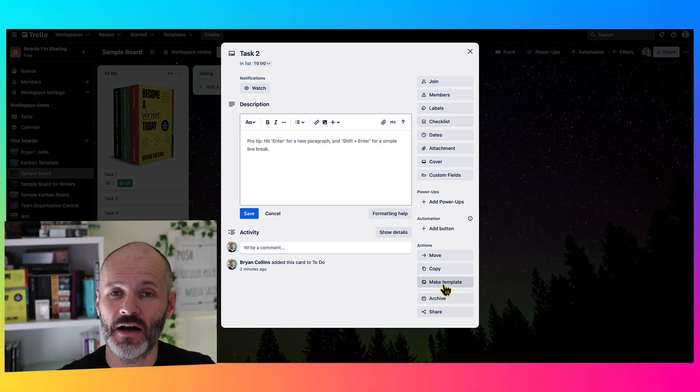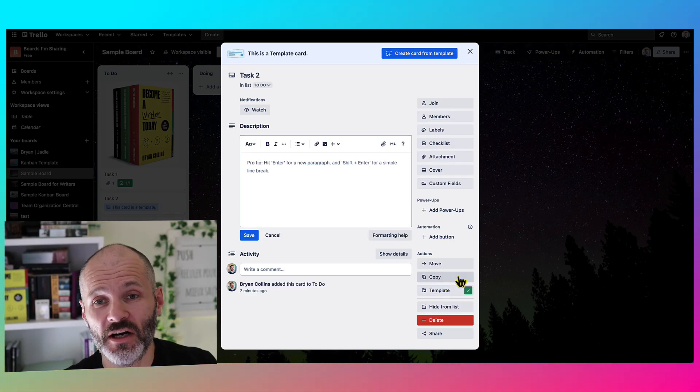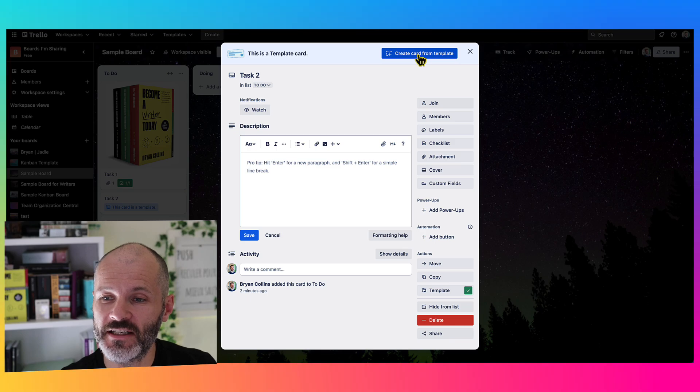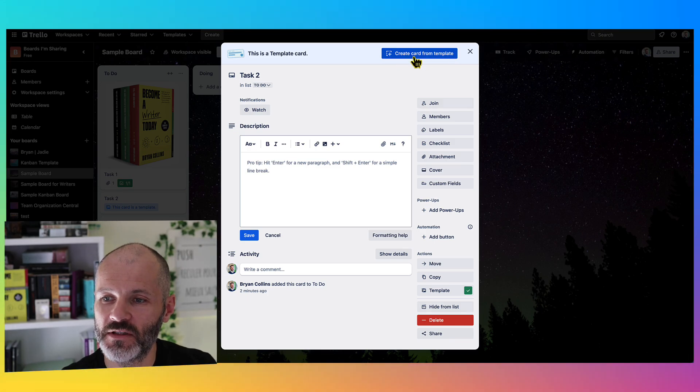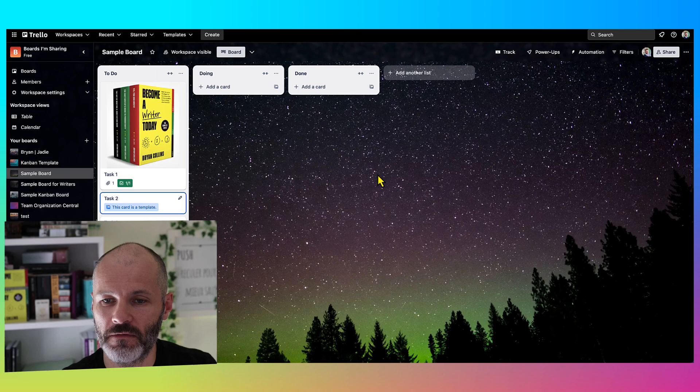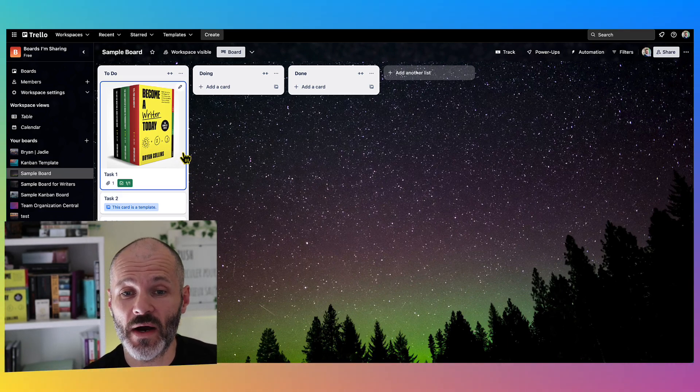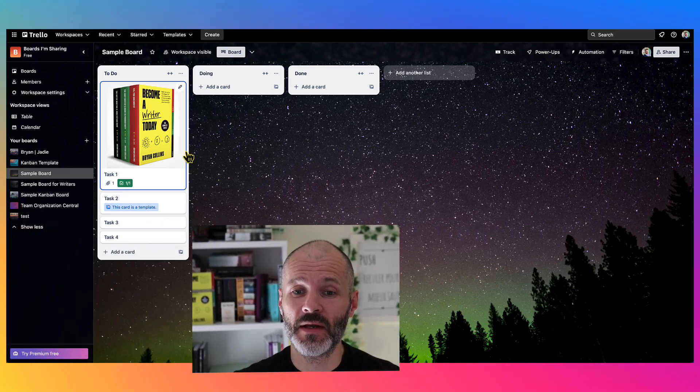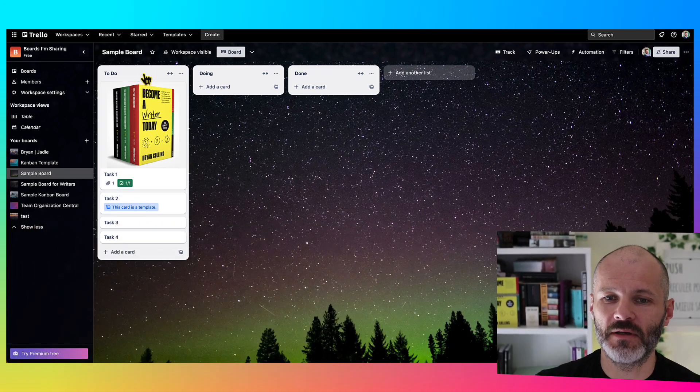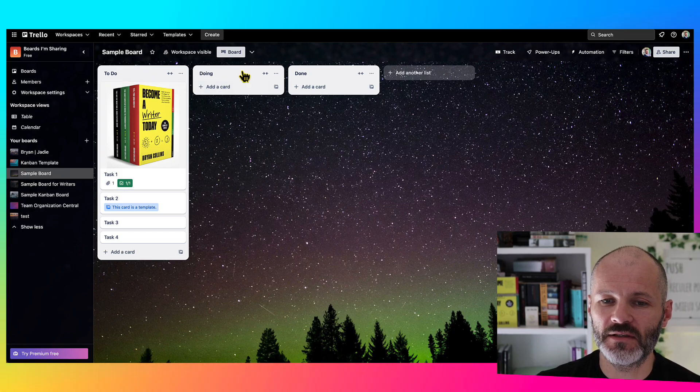Let's say you have a Trello card that you're using for publishing articles on your website. You could turn this into a template, and then you can click on this button to duplicate this template for your workflow. So as you can see, Trello is quite customizable. But I still recommend keeping things simple. So start with three columns: To Do, Doing, and Done.